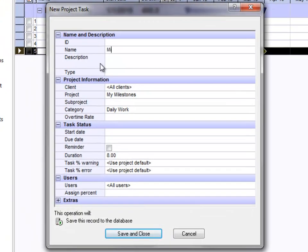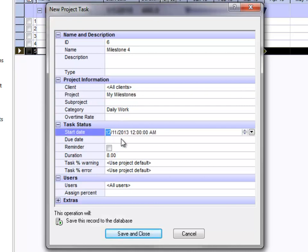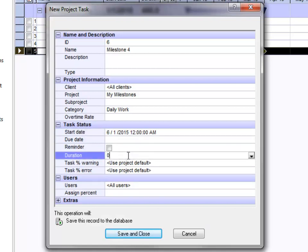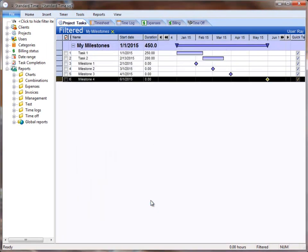I'm going to name this Milestone 4 — of course you can use any name you like. These are really just the events that you would be checking your project at. You can see that this is assigned to my little project here. I'm going to give it a start date and a zero duration, because that defines a Milestone as opposed to a project task. This Milestone is going to be assigned to all users, though you could assign it to different users who might be working on different parts of the program so that they would see their own Milestones.